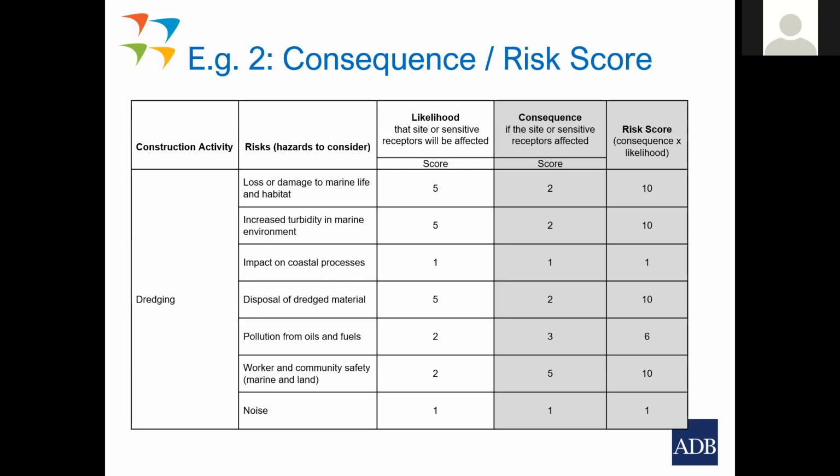It has to be taken onto land, and it's a requirement that it is disposed at an approved disposal site. So therefore, the consequence of that is likely to be moderate, given the approval processes that it has to go through for disposal.